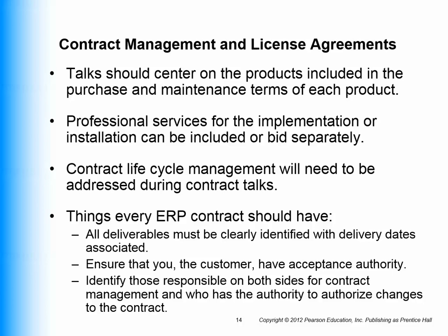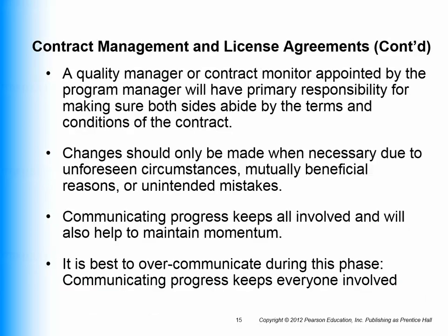What you want to avoid is a situation where you have consultants coming in and they have no vested interest to finish in any given time. Consultants, when they're in helping you, you're on the clock. You know, the clock is running, and the money really adds up. So you need to do what you can to keep the contract terms tight and don't allow consultants to run up the tab on you.